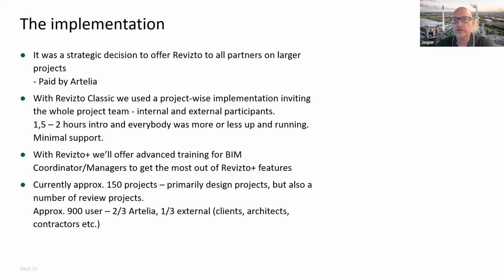These are primarily design projects, but we also have review projects. And with review projects, I mean when we have a phase review, cross-discipline, we take a copy of a design project that is from beginning to end and export it out to a review project. That means that the models and drawings won't be updated. Then we do phase reviews on that project, identifying issues.